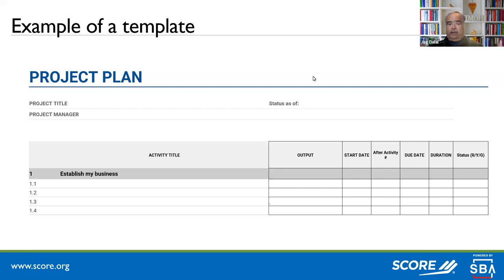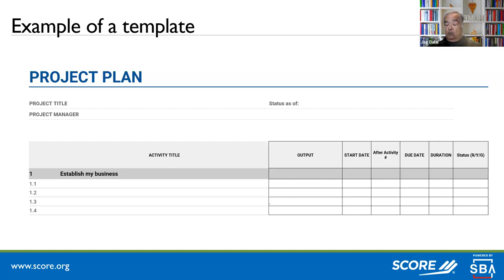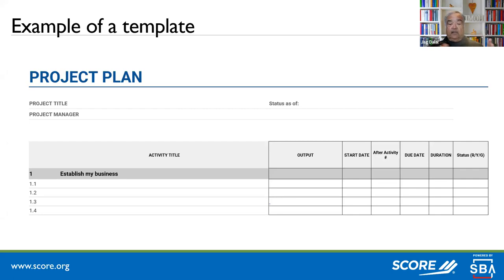Here's a template, and Steve will send it to you. Activity, output — defines exactly what the output looks like, such as getting a state number, getting an identity, identifying the name. What's the start date? Are there any dependency activities you can't do until something else is done? What's the due date? What's the duration? Remember — duration and due date are two different things. Eight hours is a duration; the due date could be two months out. And finally, what's the status: red, yellow, or green.